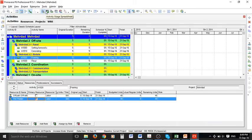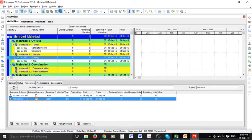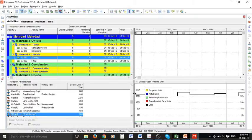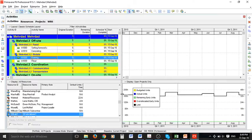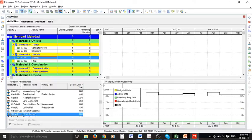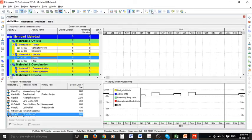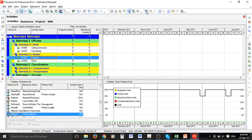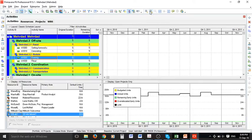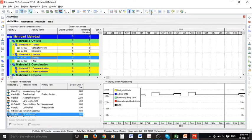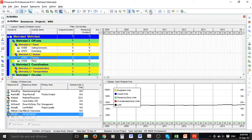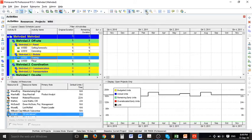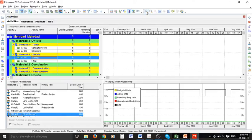We have activity or resource usage profile. So if we click on this one the screen changes and you can see different resources and their usage. You can zoom in and zoom out to see a better view of your resource usage. If there is a red bar it shows that we have over allocation and we need to change the level of available resources.